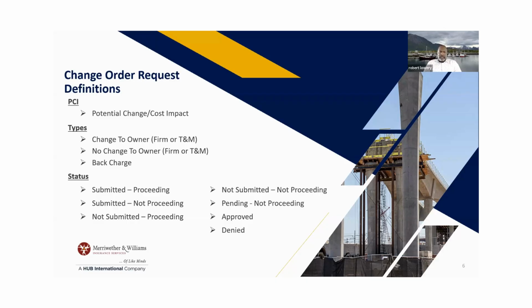This also could be you do an RFI, request for information, and you send it over and it comes back saying, oh, I want you to do X instead of Z, but that's not in your scope. So then you're going to be able to create a cost impact in your own numbering system, give them a ROM so you can get the final numbers put together. So there's a lot of communication that needs to go when you're starting to identify potential cost impacts.